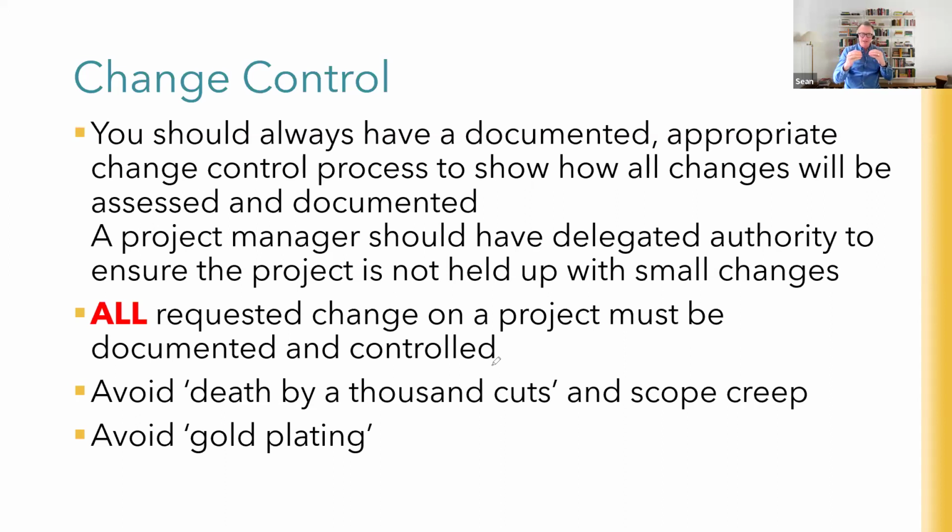We don't want a small change request that can be handled in that minute to have to go through a large 3-page document that then has to wait for the next change control board to meet in 2 weeks' time. That small change that was requested verbally over a coffee should be able to be dealt with by a simple email exchange and then updating the change register in any documents as well. But the point is, all changes must be documented. What we're trying to do here is avoid death by 1,000 cuts and scope creep and gold plating. We covered scope creep in the defining a project scope module, but it's worth repeating just really quickly here.